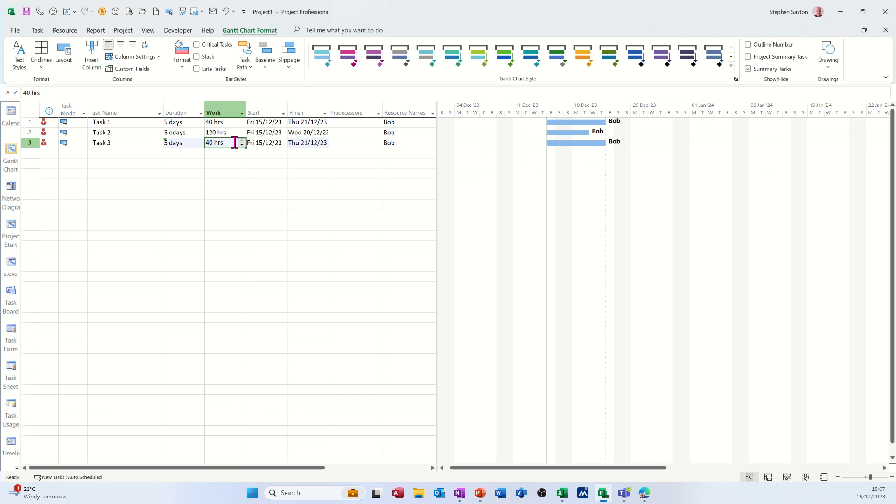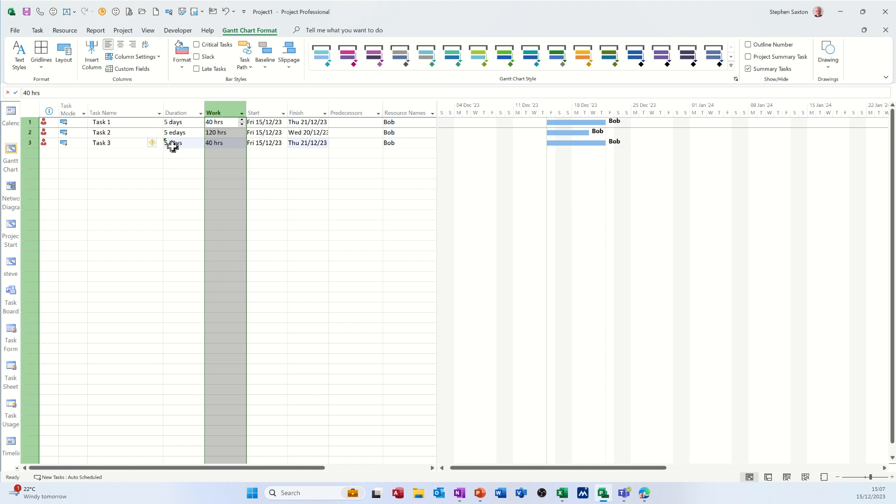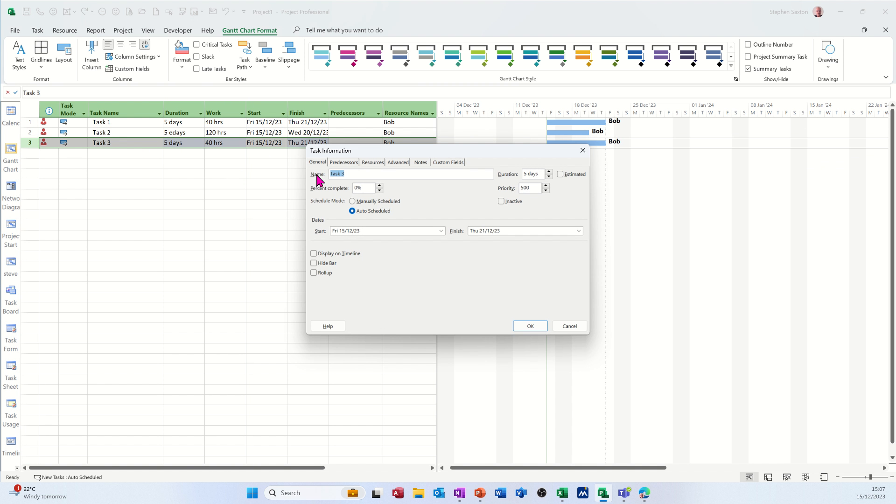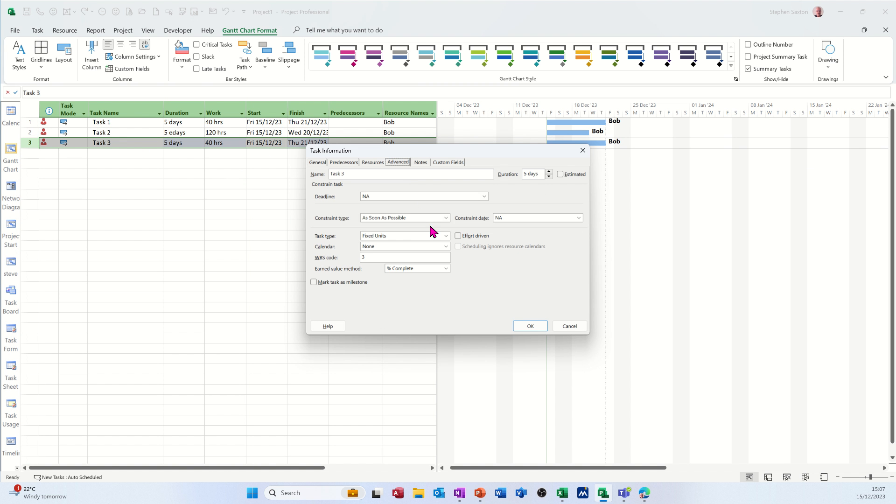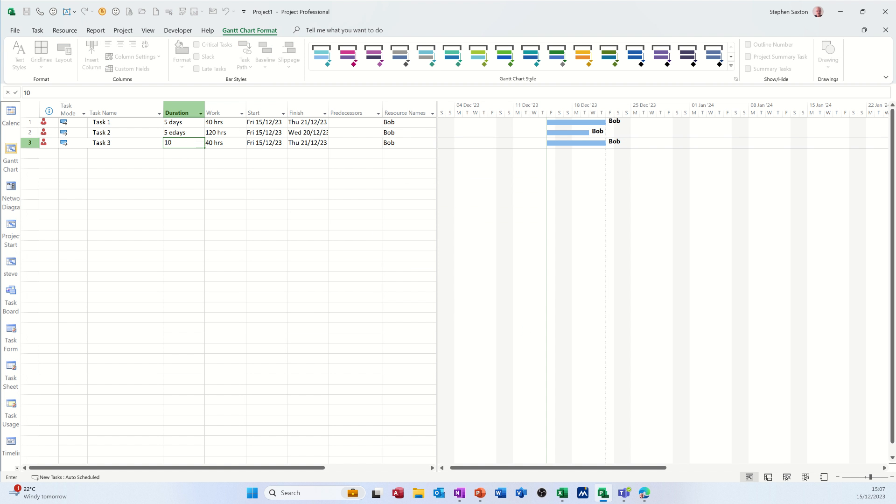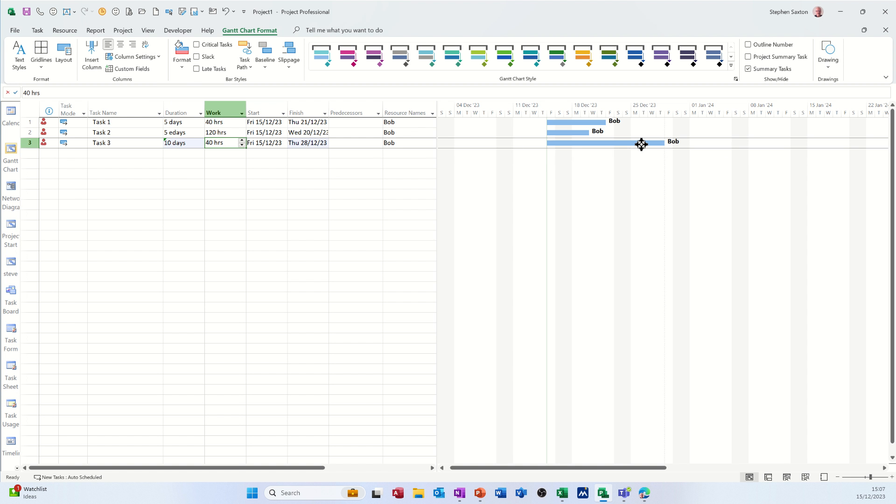Now the hours, the work one. Now if I put that to five days, he's actually doing 40 hours work. That's the actual work. Now you can set things to be fixed work. If you go into, if I just double-click on the task, you can do that in the advanced tab. I could set that to be fixed work and just set that there. Okay, and that will always be 40 hours. If I put 10 days in there, that stays at 40 hours even though duration has gone a bit longer.